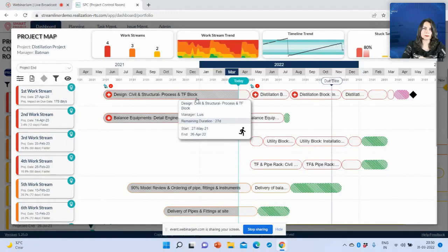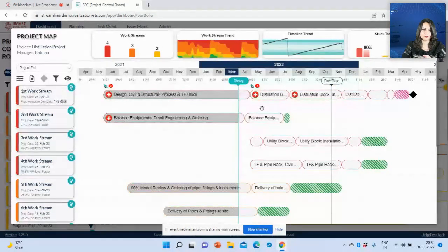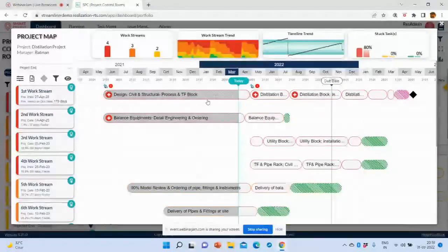And how do you break the activities into work streams? That's a question by Joshua. Okay, so we don't break the activities into work streams. We just define the boxes, just like Sanjeev said. We try to understand where the integration points are, because the problem that Sanjeev showed arises when there are integration points and there are resource shortages, right? So we are trying to figure out where those integration points are, and we are defining the boxes accordingly, right? And we are defining the dependencies between the boxes. The work streams are getting created by the system. We have nothing to do with that.